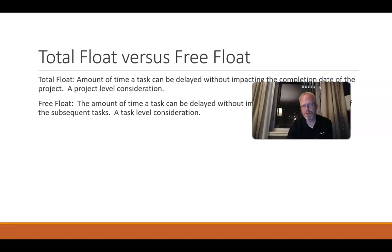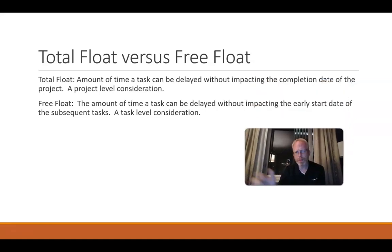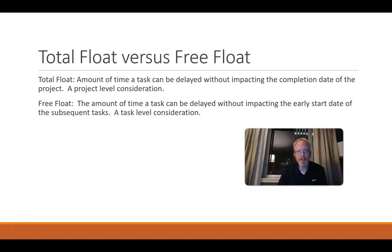Let's see if we can try to demystify it a little bit. By learning critical path, we know what float is. Critical path is the path that typically has zero float in a project plan, and then the other parallel paths that do have time or capacity — we call that float. If we add up the float across an entire lane, we call that total float.